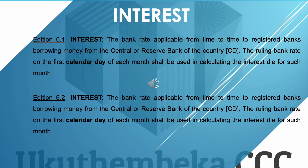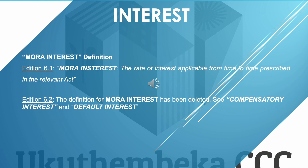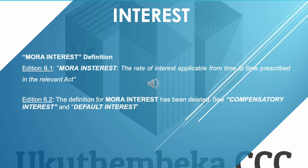Edition 6.1 had a definition for mora interest, which was 'the rate of interest applicable from time to time prescribed in the relevant act.' In Edition 6.2 this definition no longer exists — it has been deleted in its entirety. Edition 6.2 now instead includes definitions for compensatory interest and default interest.